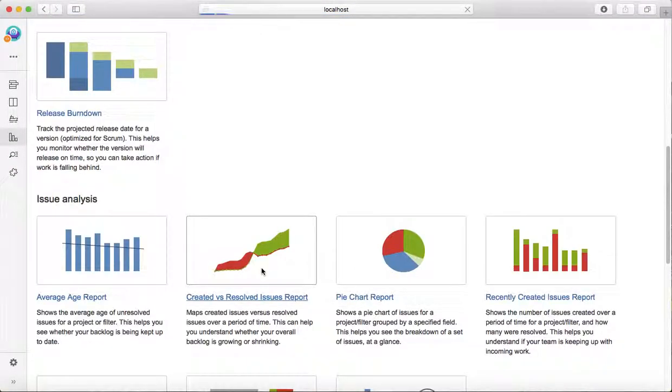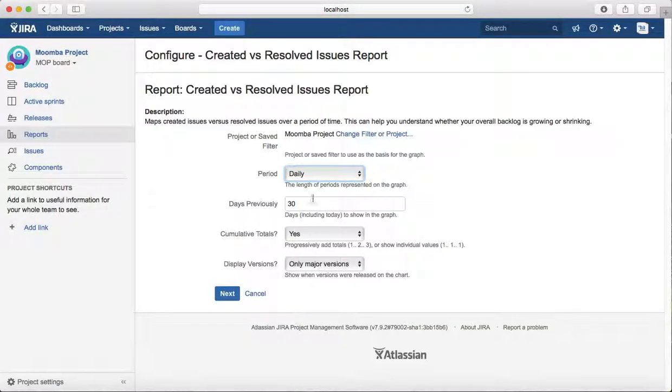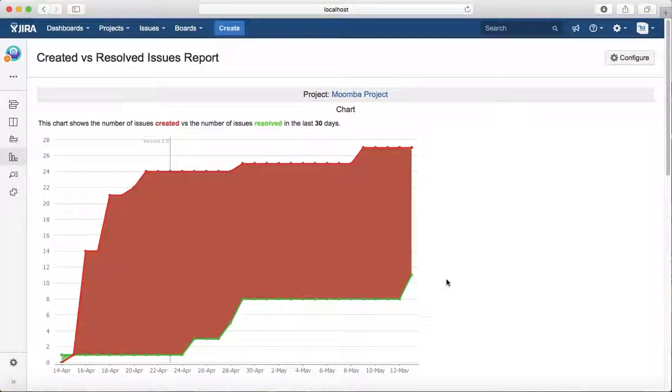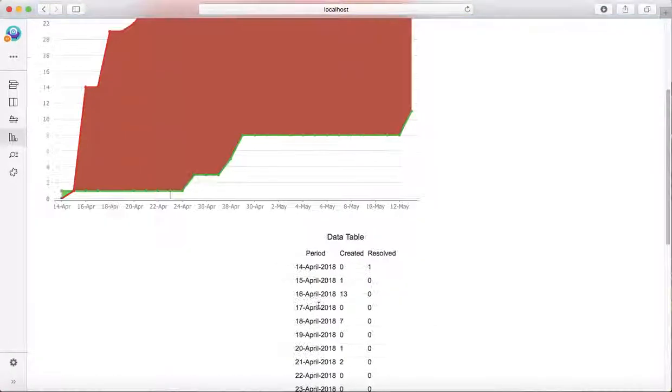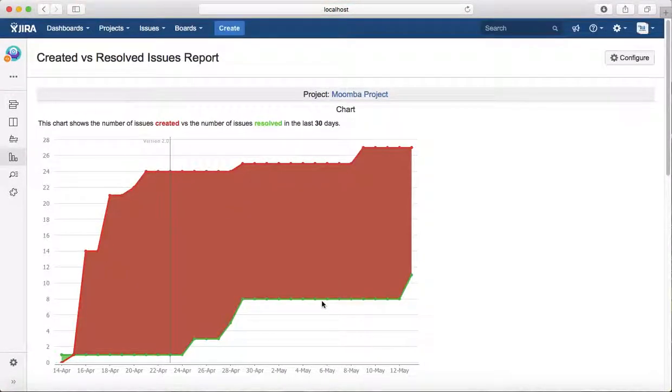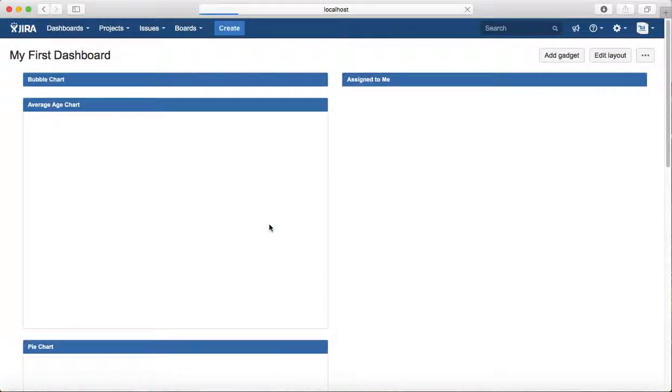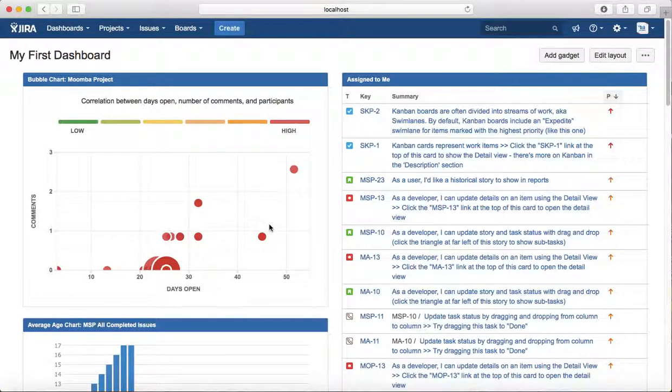The created versus resolved report will give you an idea of what has been created and what has been resolved till date. You can see here the green line is the resolved in the last 30 days. That is pretty much all about how you can view what has been done in a particular project in JIRA. Thank you.